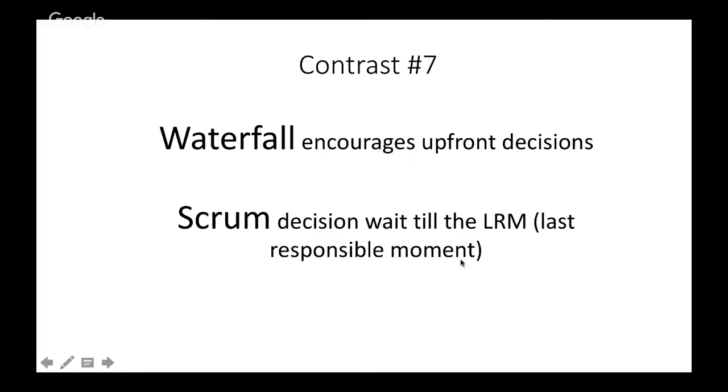Number 7. Waterfall encourages upfront decisions. Requirements are written and detailed upfront, dependencies are identified upfront, design is aligned and approved upfront, even the UX screens are defined upfront. With Scrum, decisions wait till the last responsible moment, often called LRM.